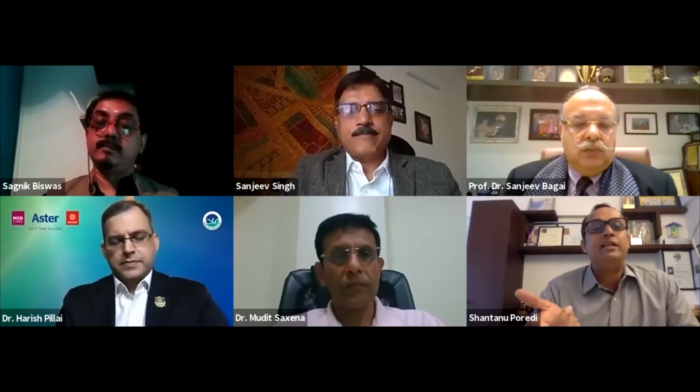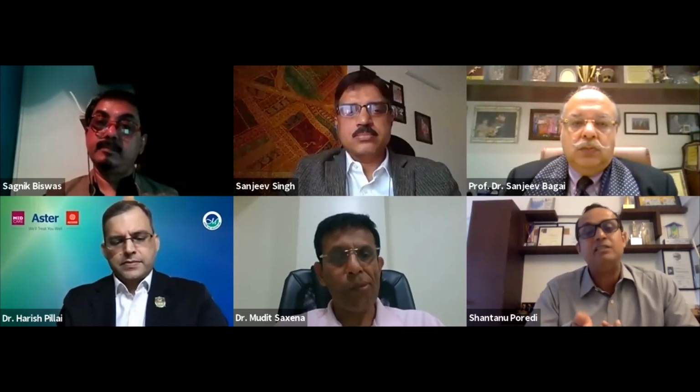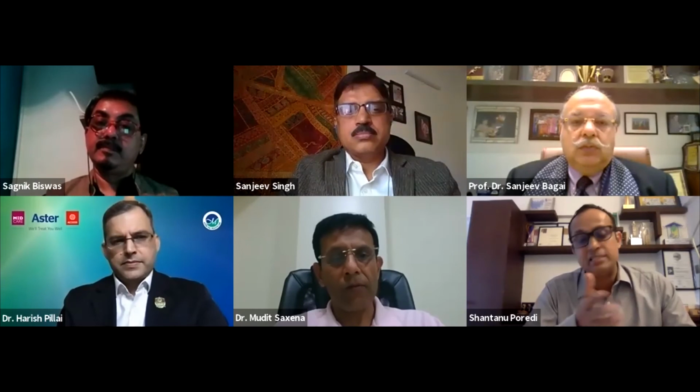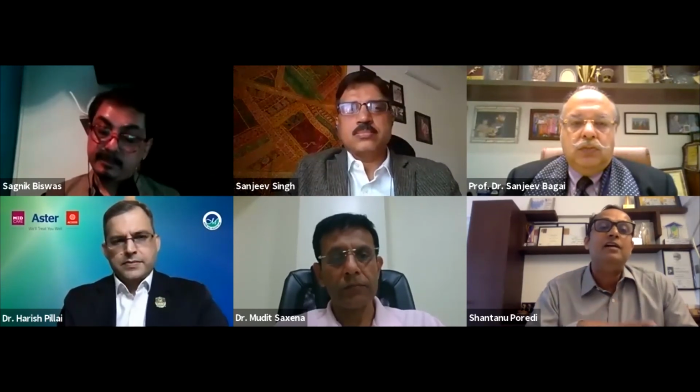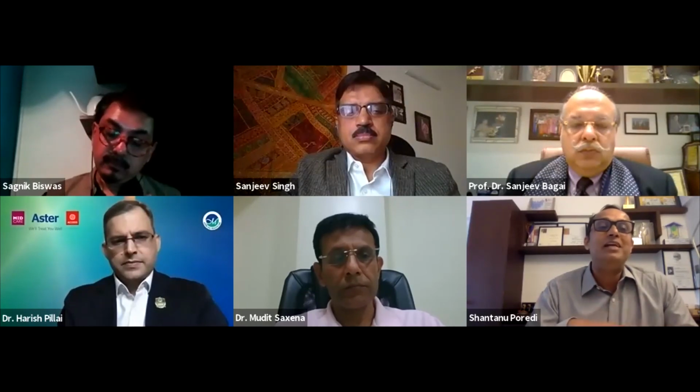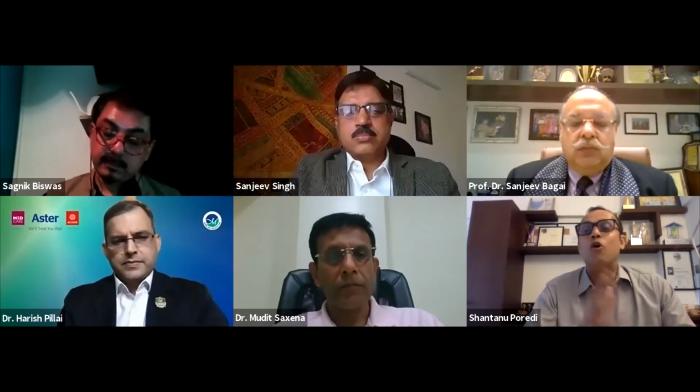And at the end of the day, when we also occupy a hospital, we go and check with the lux meter if we achieve those lux levels as per our room data sheets and see the performance. So I think it's very, very scientific. It's not done very casually, saying that this is adequate and that is not. There is a data sheet that gives you all of this information.